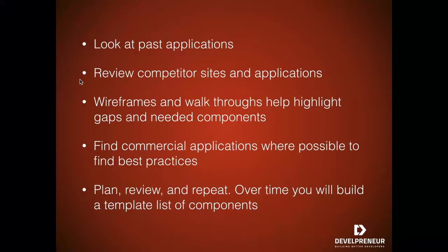As you go through all of this, put together your plan. You've got your components, so take a look at your component list, and look at whatever you've got as far as requirements, wireframes, or clickable demos. Look at all of those things, review the two against each other, build out your component list, and then repeat and walk through it again. Do it a couple of times through, because each time you probably will find a gap or two. There's something that you forgot.